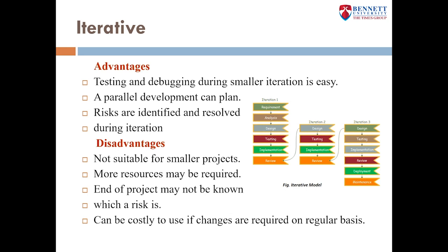Also, if we compare iterative versus incremental model, then an incremental approach breaks the software development process into smaller and manageable portions known as increments, and each increment builds on the previous version so that improvements are made step by step. Whereas an iterative model means software development activities which are systematically repeated in cycles known as iterations. A new version of the software is produced after each iteration until the optimum product is achieved.